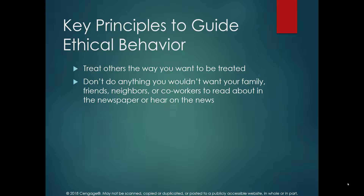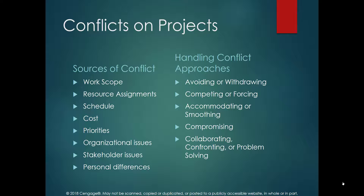Conflict can happen in different areas and have various sources: work scope, where people disagree about tasks; resource assignment or schedule; cost; task priority; and organizational issues. To resolve conflict there are several approaches. The first is avoiding or withdrawing — temporarily ignoring the conflict — but this is not efficient because the conflict will resurface later and escalate, becoming worse the second time.